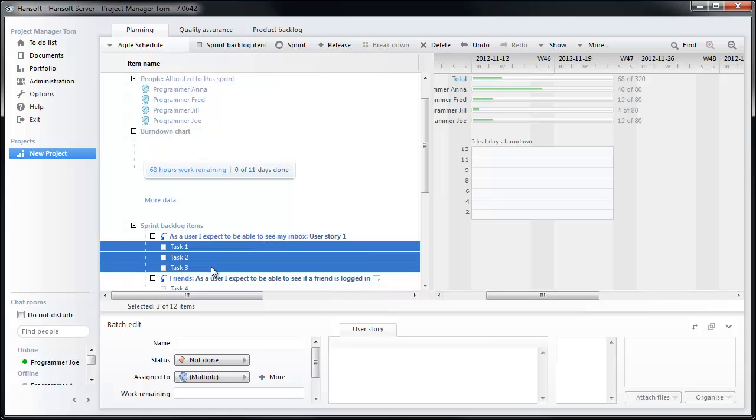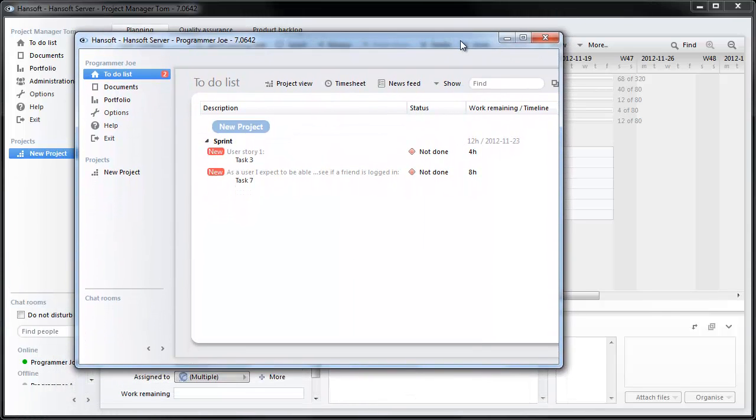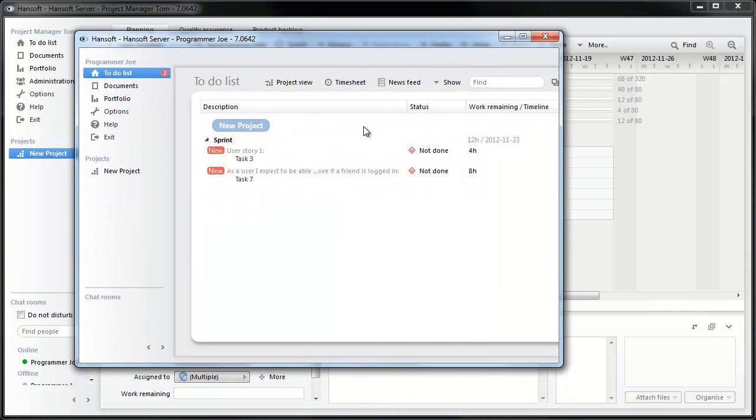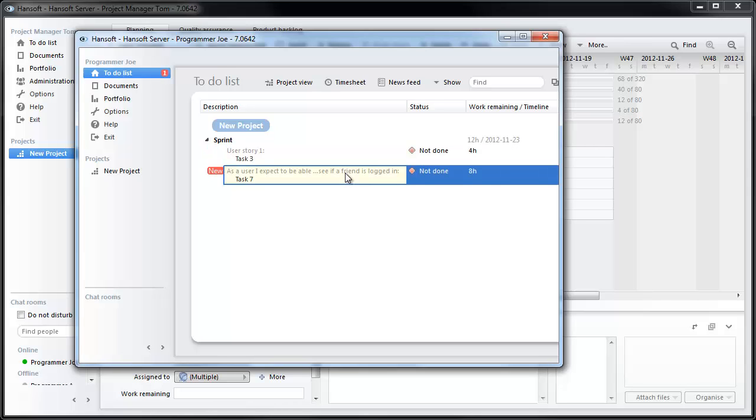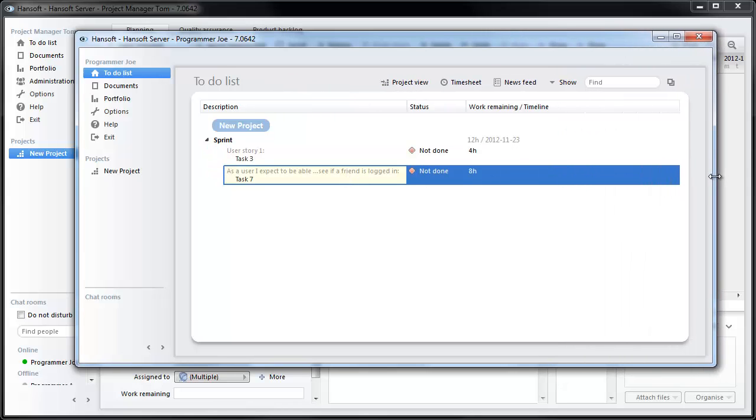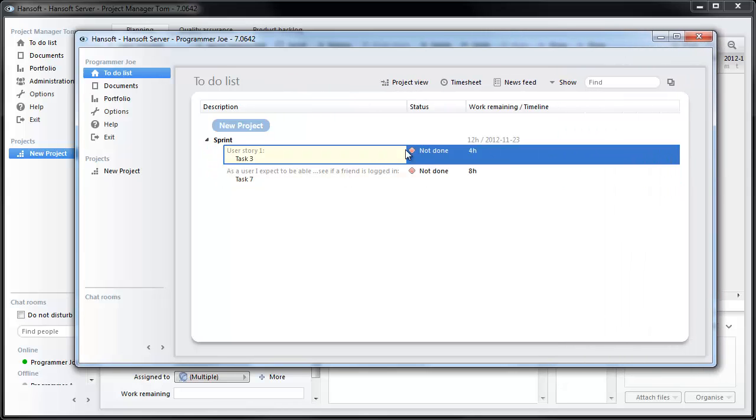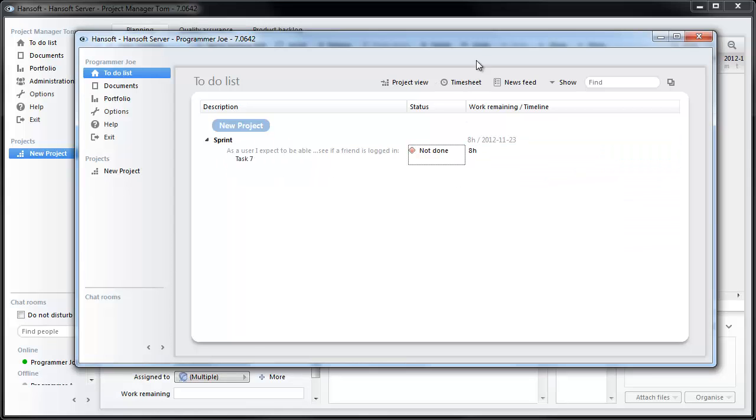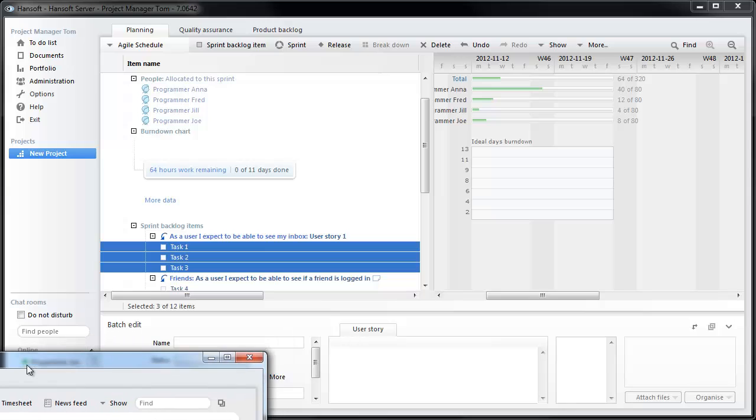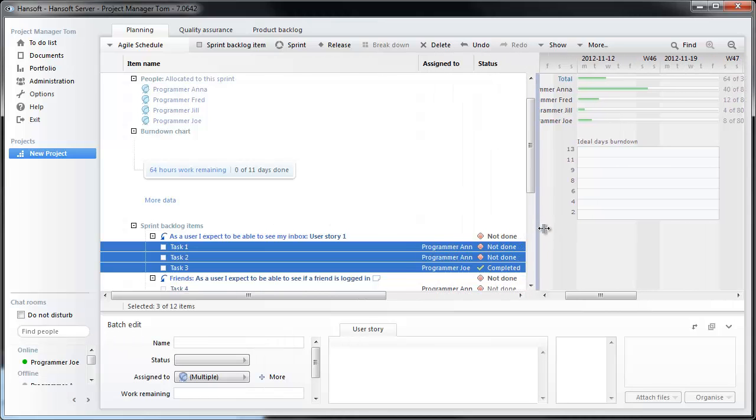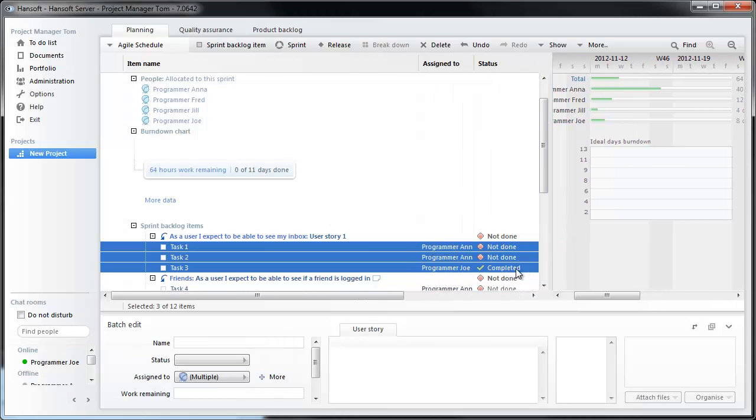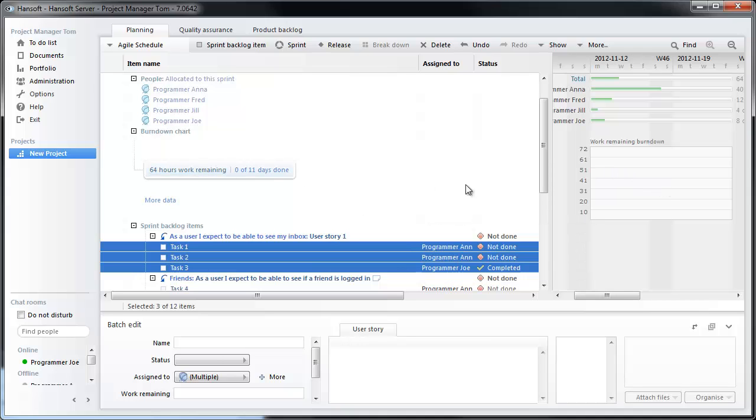Let's look at how this looks in programmer Joel's to-do list. Here he has these two items, and if he completes one of them, you'll now see that it has been completed here in the sprint. And we also have a little less work remaining. And if time moved on, you would start seeing a burndown here.